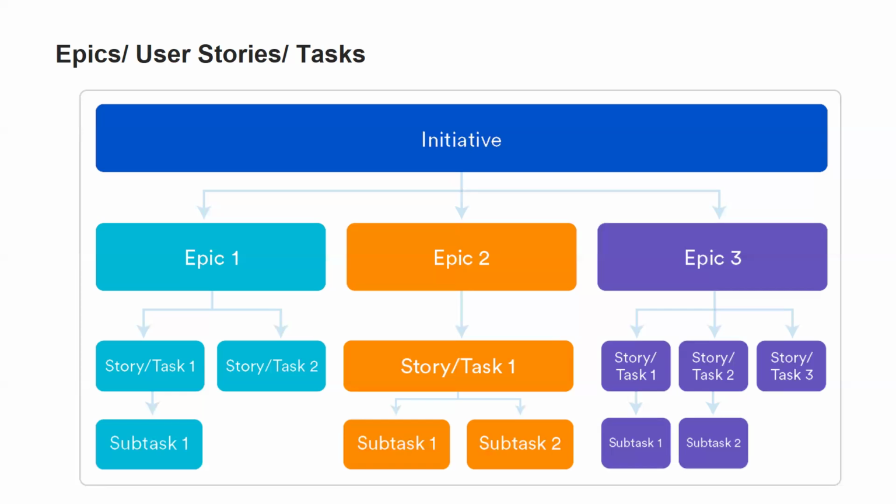Under this epic, we will have subtasks. Let's say there is a website, right? That's our initiative. Under the epics, we are going to develop the main home page, develop the customer login page. Another epic can be develop the payment gateway. Like that, there can be multiple things. Under the home page, we can have a story as creating the basic UI, right?